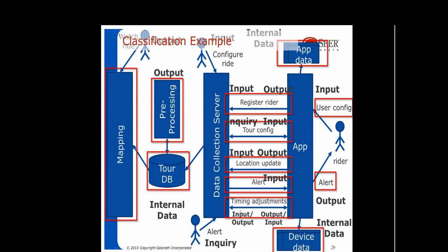So here you're counting faithfully with function point counting rules. You just have to recognize that there isn't necessarily one app that you're counting. There can be a system of different apps that are connected with each other that could have been done in parallel, even by the same team, but they're not one app. They're a system. Systems get counted at the individual component level, each of the apps going into the system.